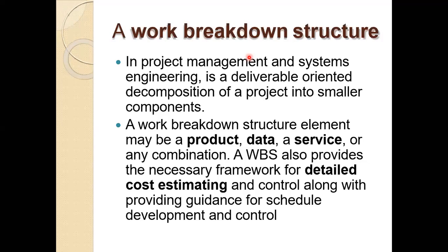Work breakdown structure also provides the necessary framework for detailed cost estimating. So this also provides a detailed framework for cost estimating, because in work breakdown structure you are taking care of small things. Is that right? So when you consider that care, automatically for that small thing whatever budget is required is going to be added, and that gives you the detailed budget, the detailed cost estimation. Rather, budget we can call a cost estimation. So suppose